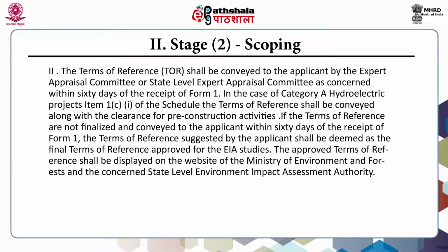Further, if the terms of reference are not finalized and conveyed to the applicant within 60 days of the receipt of Form 1, the terms of reference suggested by the applicant shall be deemed as the final terms of reference approved for EIA studies. The approved terms of reference shall be displayed on the website of the Ministry of Environment and Forests and the concerned state level Environment Impact Assessment Authority.